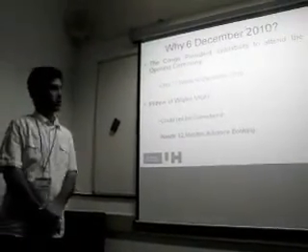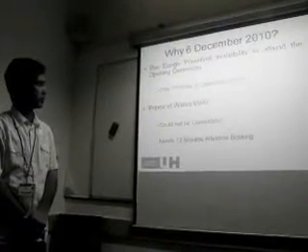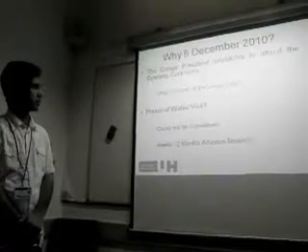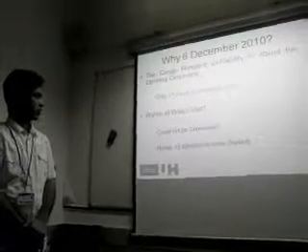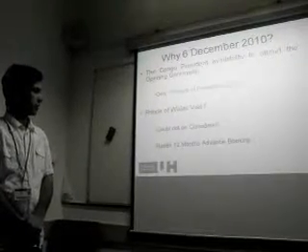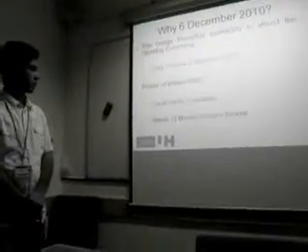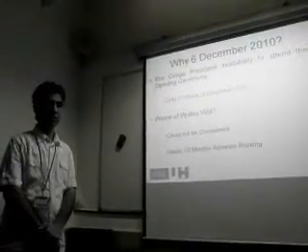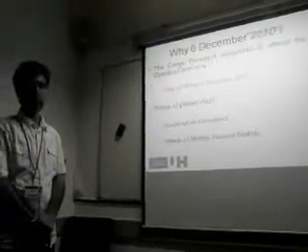Now we have chosen December 2010. Why did we choose this particular date to finish the project? Because the President of Congo was only available in the first week of December. That was one of the reasons. And there was another guest, a prince as well. He needed an appointment 12 months in advance for the opening ceremony. So he could not be considered in the revised plan, because today is 23rd March 2010, so that would push the end date to March 2011.